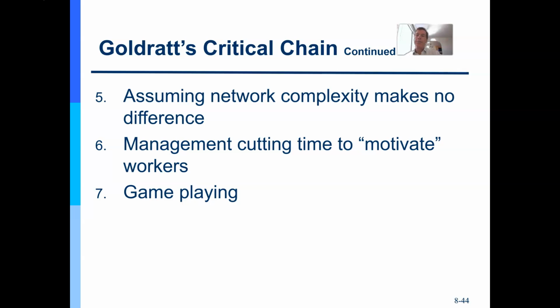I will call it the buffer use rate. How much of my buffer is being used up? And I will manage that. And I think people, even though they gave me an honest estimate, still with student syndrome, still with Parkinson's law, etc., that people's optimism, I don't think they were right. I'm not saying they were cheating me. I'm saying they gave me a good estimate, but they aren't right.